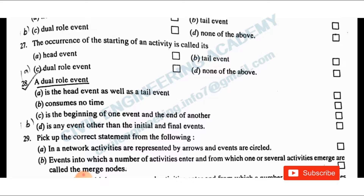The answer here is: a dual role event is any event other than the initial and final events. All events in between the initial and final events are dual role events.